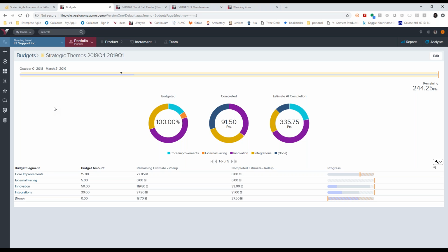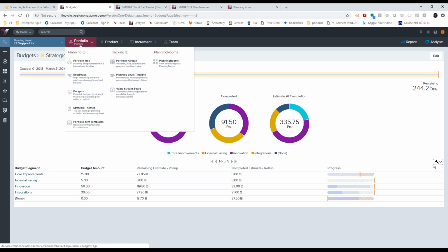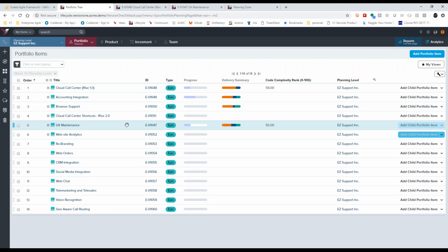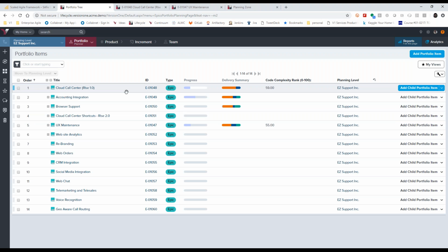In terms of just prioritizing them and moving them around on the roadmap, the answer is no. So we don't adjust the timing of things or the prioritization of things because a change in priority has occurred. And what I mean by that is, if something in here at the top has moved down, we won't automatically move the stories down in their respective backlogs at the team level. This will just be a leading indicator to those teams that this effort has been deprioritized and they need to realign to the new prioritization.